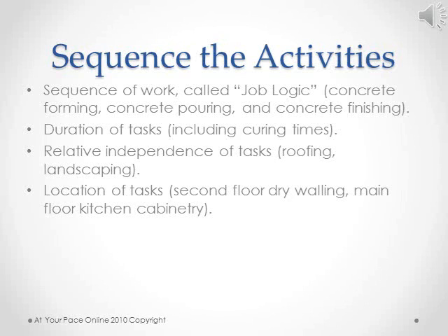The next step in the CCB recommended process is to sequence the activities. When placing the tasks in proper sequence, group the tasks into fundamental operations and analyze each operation to determine the sequence of work called job logic. Duration of tasks, relative independence of tasks, location of tasks.